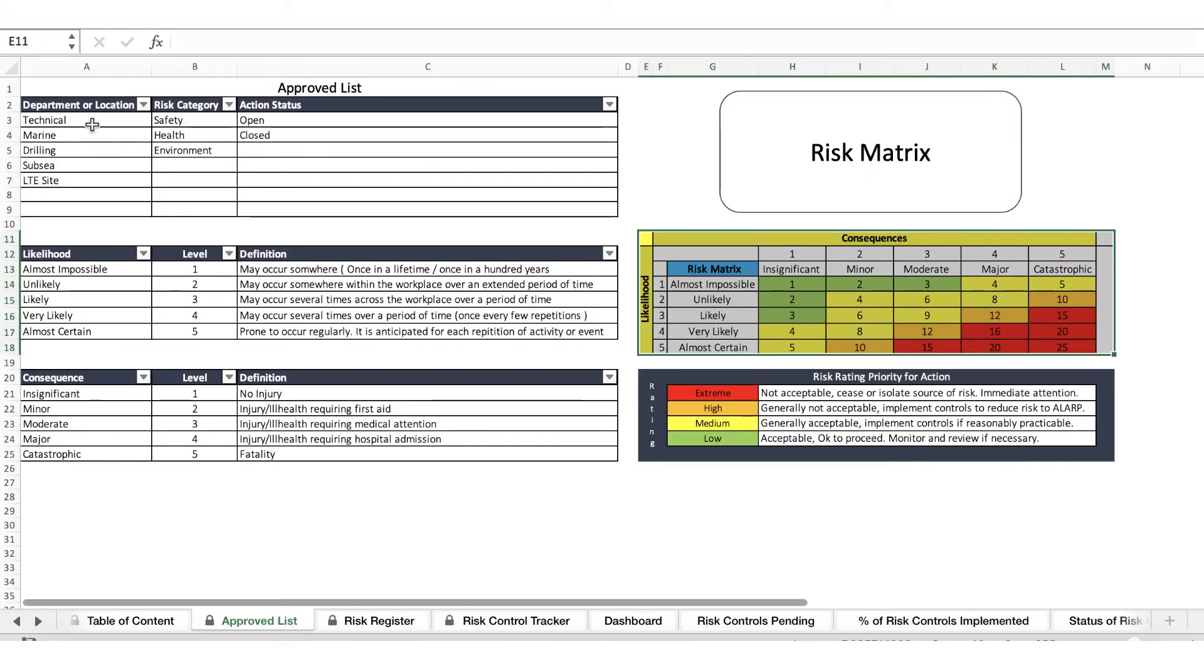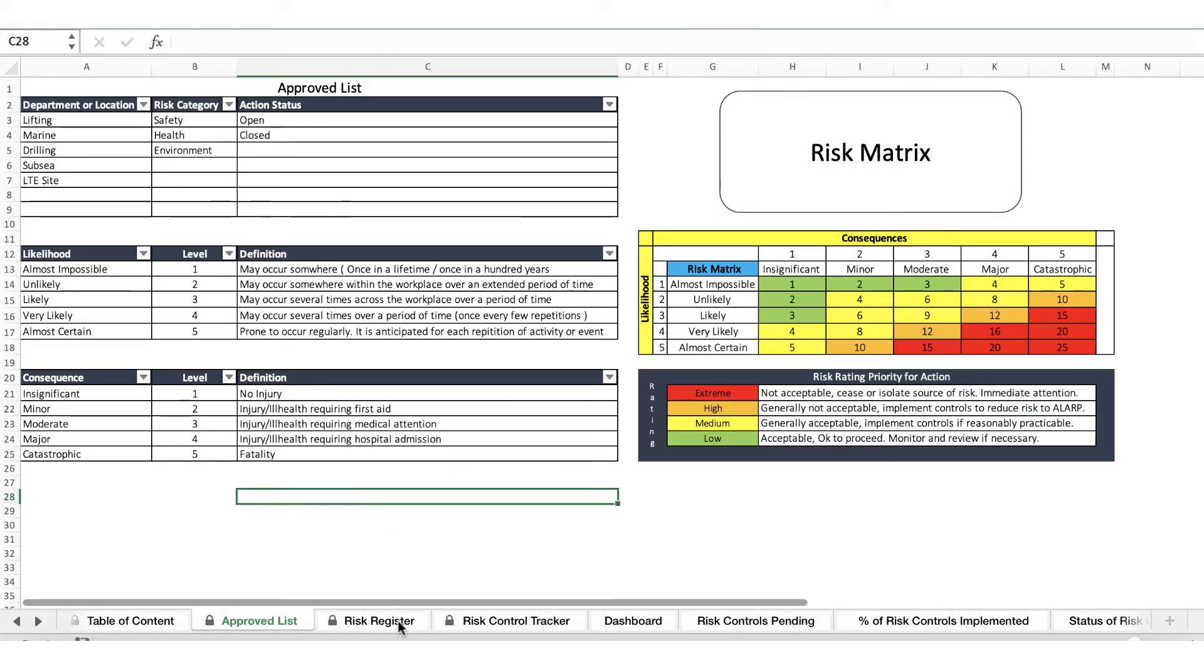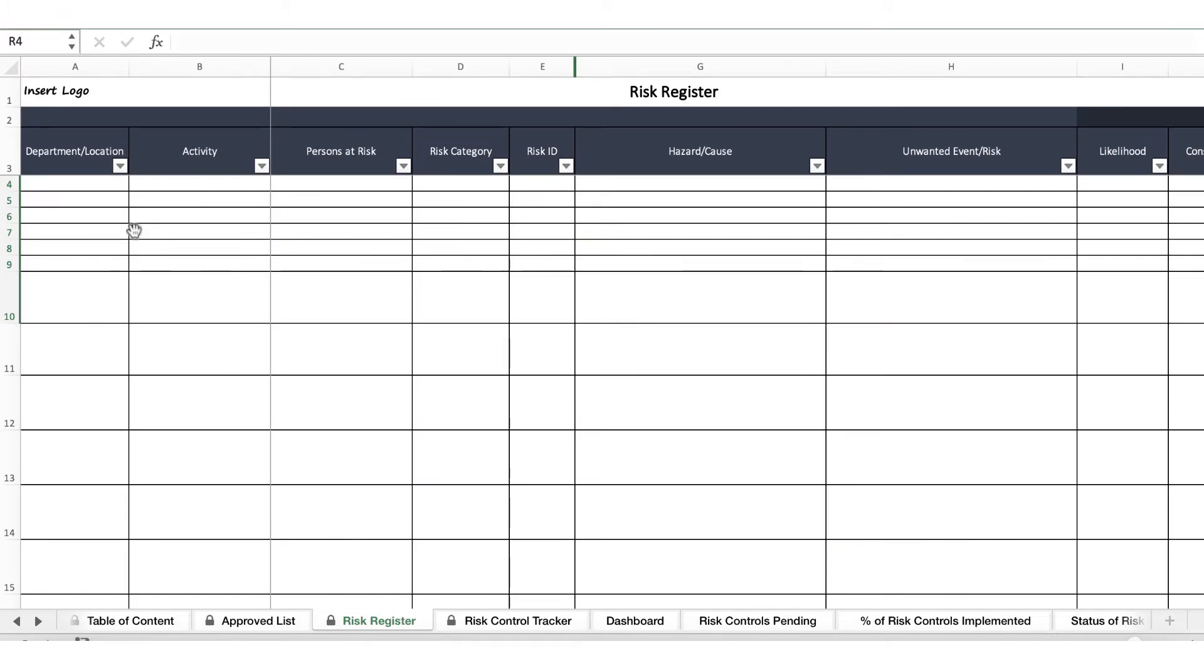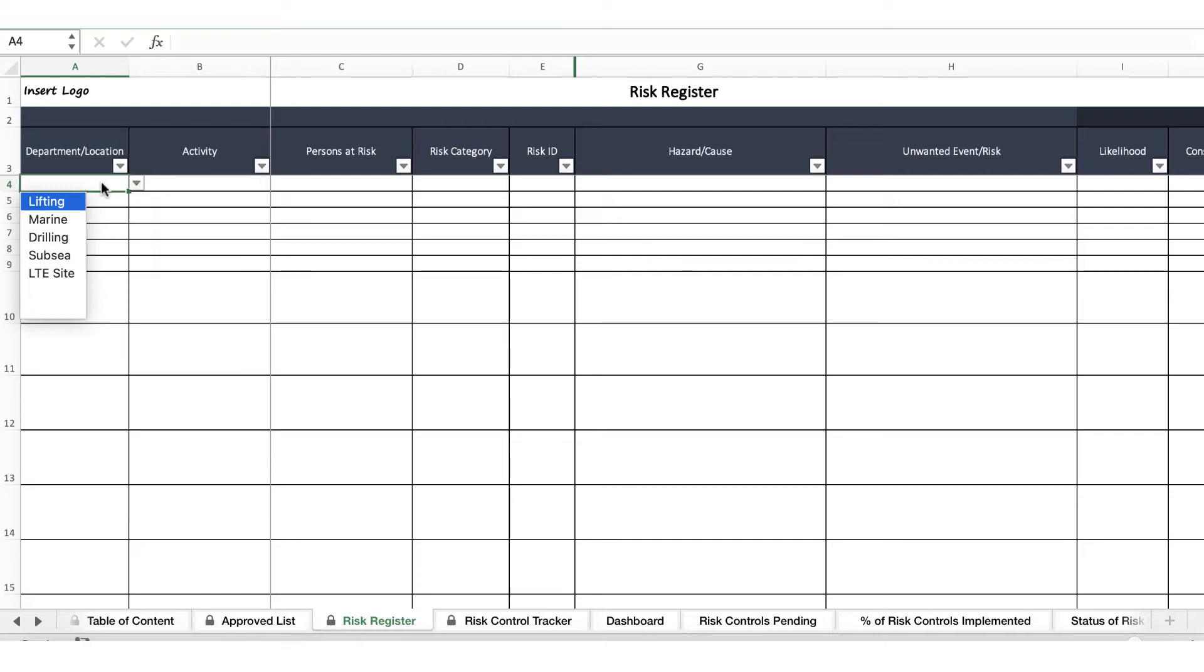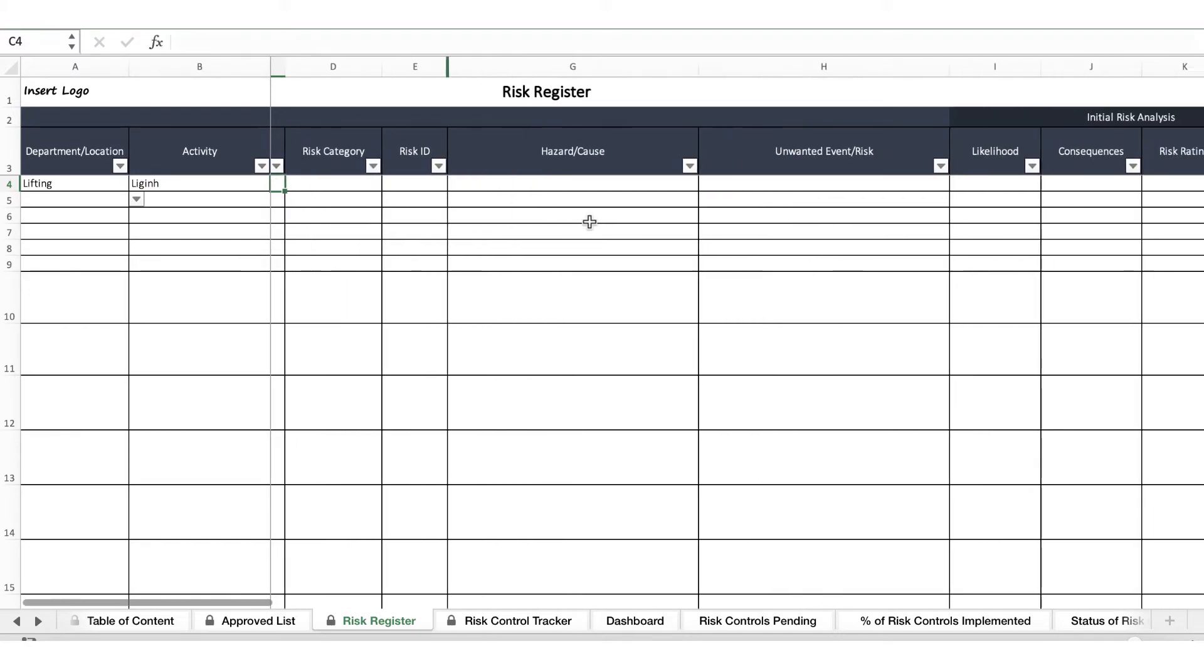If you want to change your department, it's just right here. You can just change the department to, let's see, lifting department. Then you come to the risk register when you start inputting your data, you select by the dropdown, you select the lifting department, you provide activity like lifting operations. Persons at risk could be the crane operator, the foreman, the banksman and the riggers, or maybe passersby because you have to be secure.